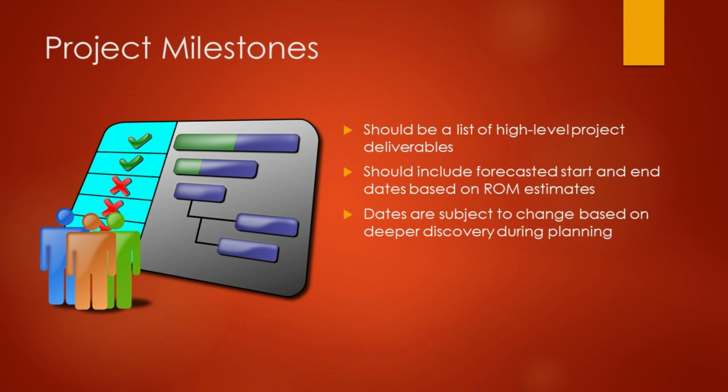Project milestones. This section should just list a high-level summary of the major pieces of work that will need to be completed to finish this project. You may need to put some forecasted start and end dates on these milestones to give decision makers an idea of when those pieces and the overall project will be completed. However, because you won't have gone through a deeper discovery and generated a formal project plan yet, these dates are very rough and highly prone to change.